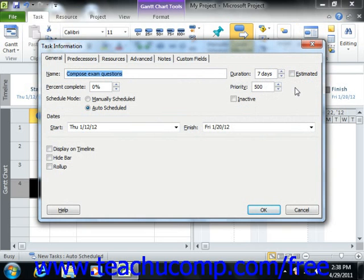Of course, the durations of many tasks in many types of projects are estimates, but checking the estimated check box simply adds a question mark to the end of the duration time. This gives others a visual indicator that the time shown is just an estimate.